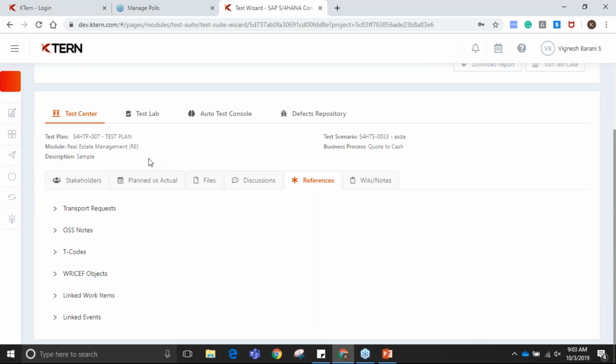If I have to explain a little more, we can consider a custom code object which is getting impacted while moving to S/4HANA. It gets remediated, and there is a test case attached to this particular custom code object, and that gets tested and everything is working fine. So when the mock conversion or the pre-conversion happens, due to no hard freeze followed in this particular project, the custom code object changed.